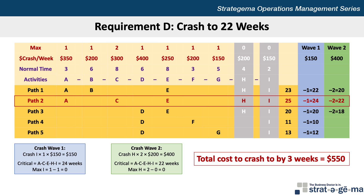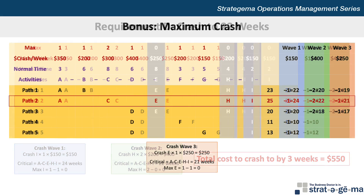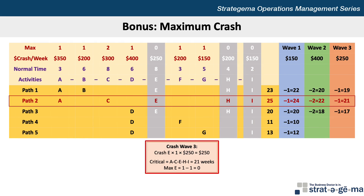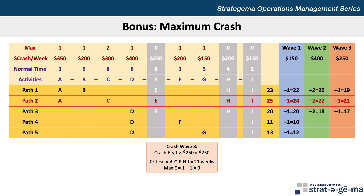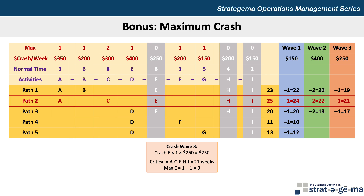Now you can stop here, or if you want a bonus challenge, let's see how far we can crash the project until we can't crash it anymore. We continue our same approach starting with the critical path A-C-E-H-I. But now we have only three activities to choose from: A, C, and E. The least expensive is E at $250, so for our third wave we crash activity E by one week at a cost of $250. We subtract one week from each path containing activity E, which are paths 1, 2, and 3, making their times 19, 21, and 17 weeks respectively. Activity E can no longer be crashed, so that's greyed out, and path 2 is still critical because it still takes the longest time to complete.